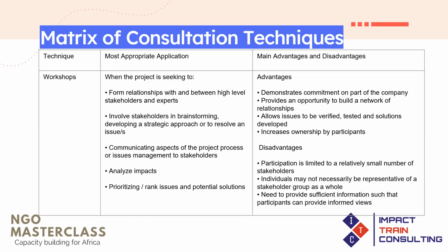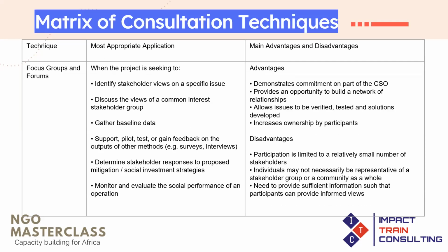And sometimes, with regard to stakeholder workshops, you will need to provide sufficient information to enable participants to provide informed views. So when you provide an agenda and you do not provide detail with regards to that agenda, your stakeholders may not provide any reasonable view on that project at that particular time. Now, another technique that you can use is focus groups.